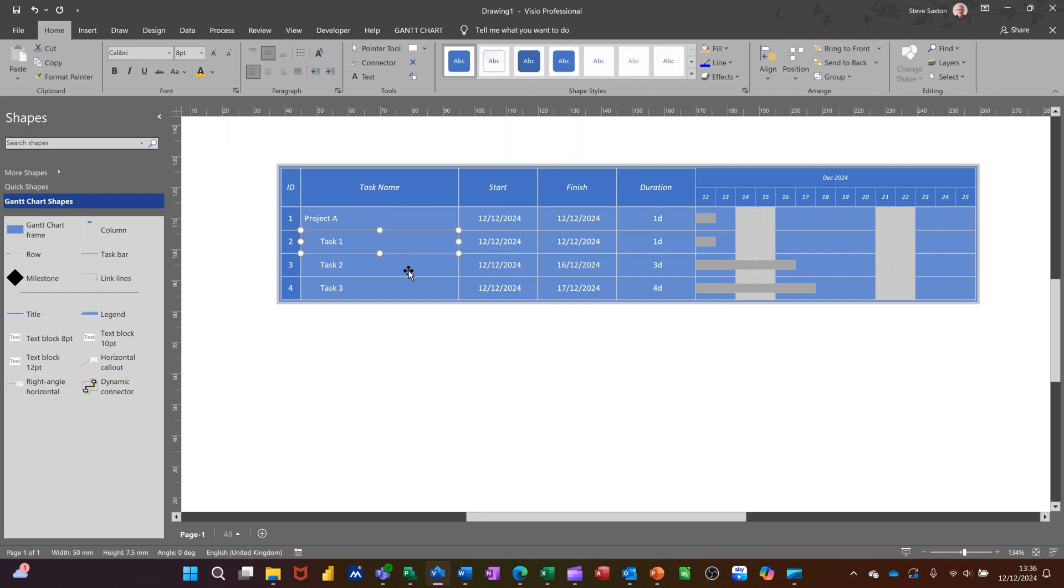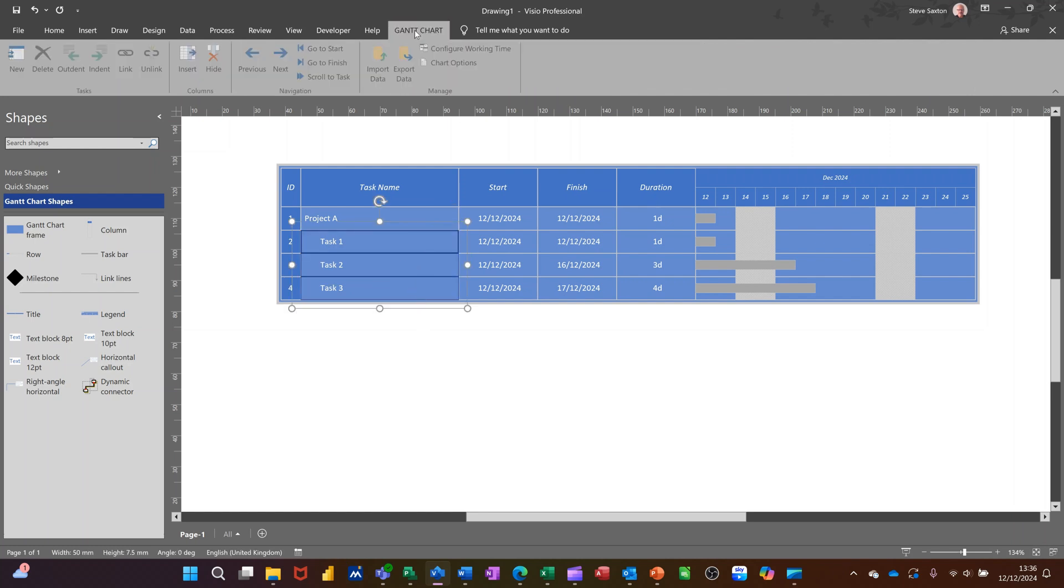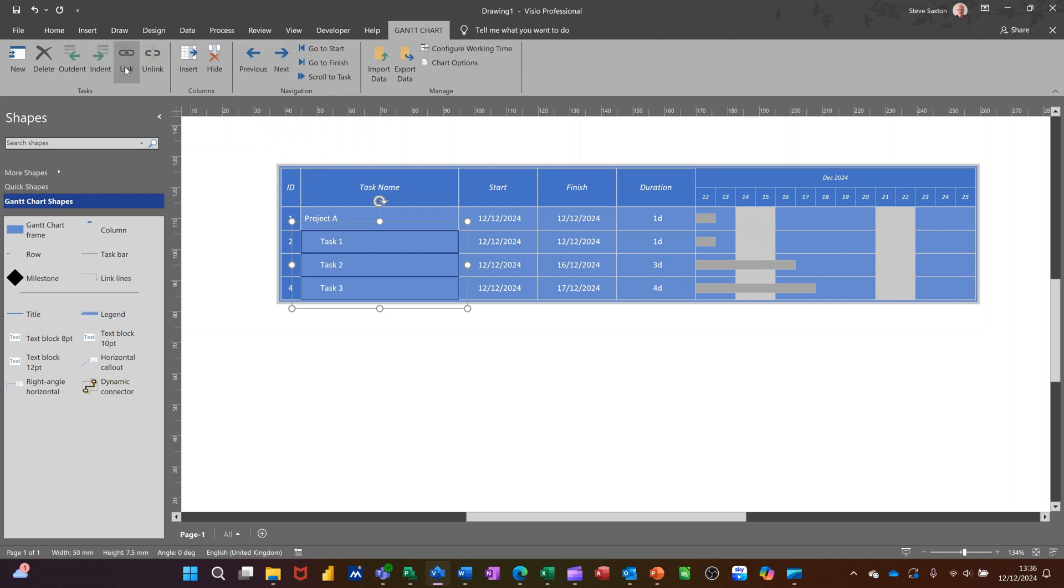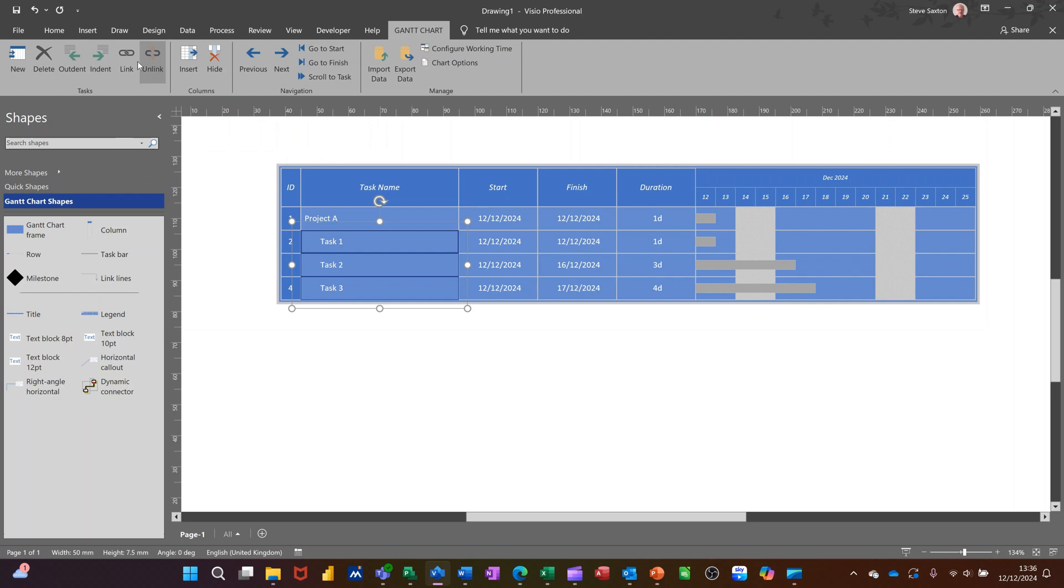So if I link them again with a shift key like that, go up to the Gantt chart tab. You've got previous, next, and then over on the left, you've got link and then unlink. And you've got indent as well there. So if I click on the chain, that will link them together. Now they're all following on, you can see how that works. So it creates the Gantt chart quite quick. It is sort of dynamic.